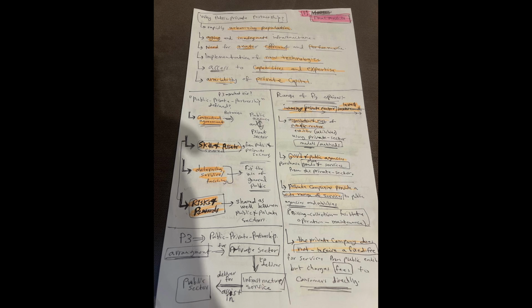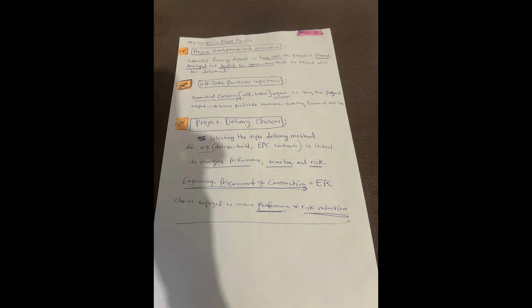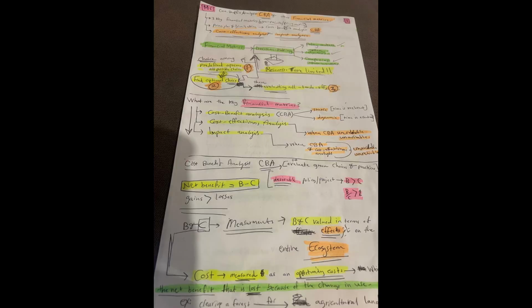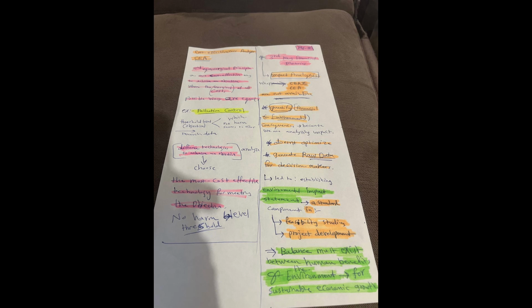So not necessarily relying on the big balance sheet of a parent company. That's the idea of non-recourse or limited recourse finance. The lenders look mainly to the project itself for repayment. Which means the performance of everyone involved is absolutely critical. Paramount. Engineers, constructors, suppliers, the operator who runs the facility day to day. If any of them drop the ball, it can jeopardize the whole project's financials and the lender's security. For your studies, remember project success really hinges on reliable performance from all these parties.